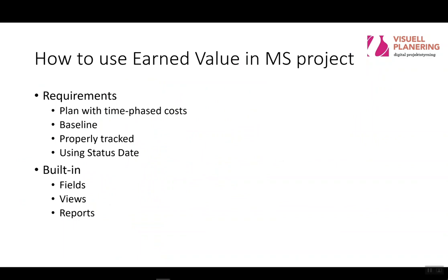So how do you do it? Let's get into the Microsoft Project parts here, and there are a few requirements that you need to fulfill to be able to use earned value. And to start with, you need to have a plan with time-phased costs.